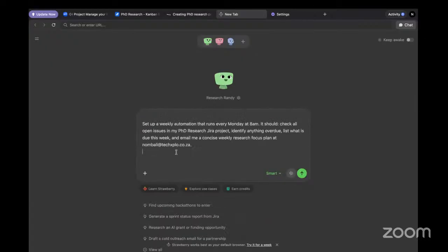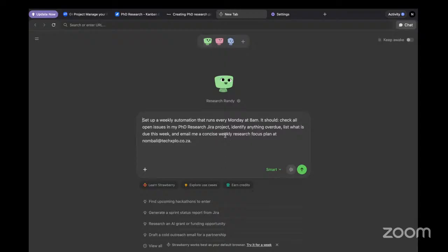So, okay, I'm just asking Jira to set a weekly automation that will run every Monday at 8 a.m. in the morning. It should check all the open issues in my PhD research on Jira, identify anything that is overdue, and then list what is due this week and email a concise weekly research focus plan to my dedicated email, right?